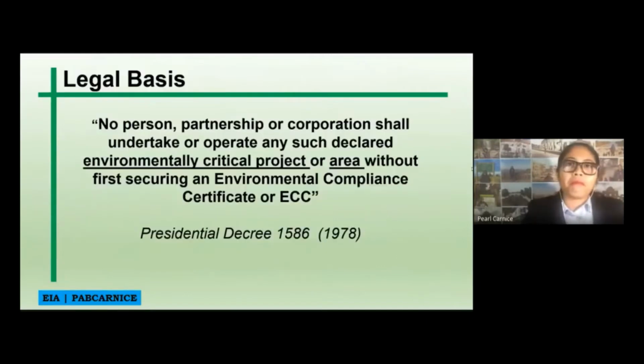So again, Presidential Decree 1586 in the year 1978. I would like to quote this: no person, partnership, or corporation shall undertake or operate any such declared environmental critical project or area without first securing an ECC, or an environmental compliance certificate.